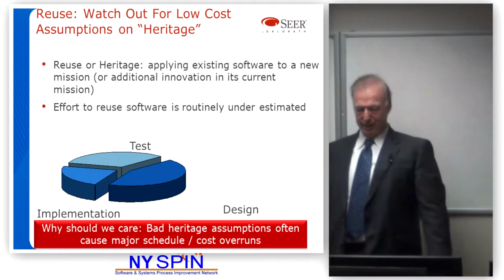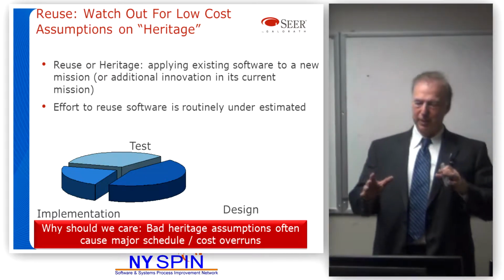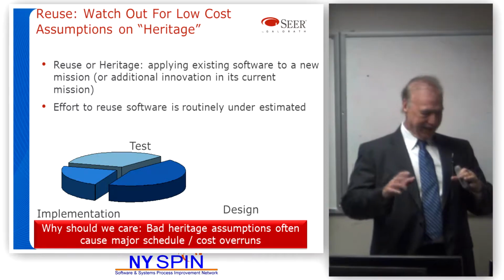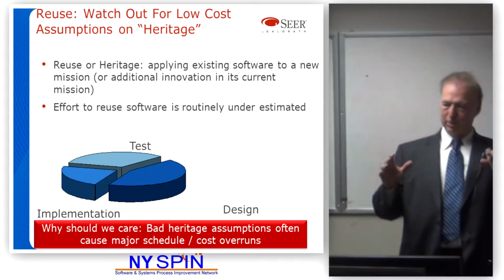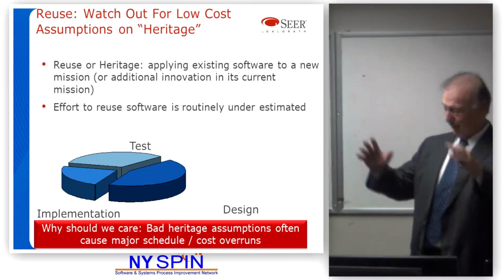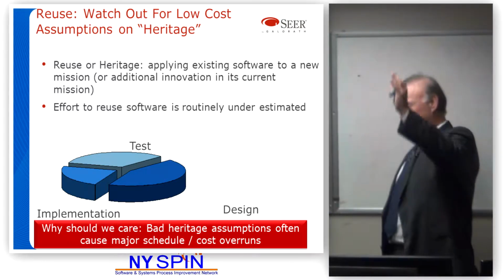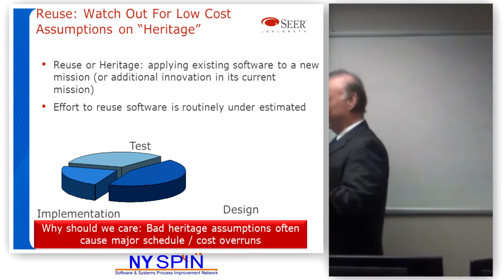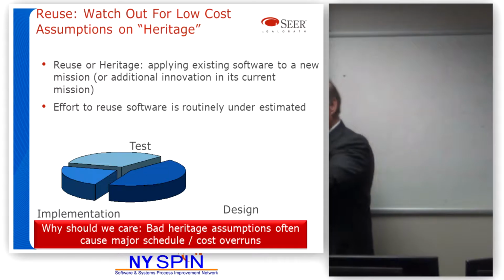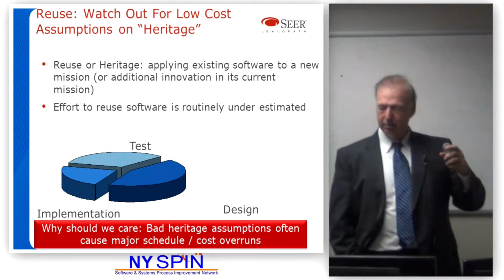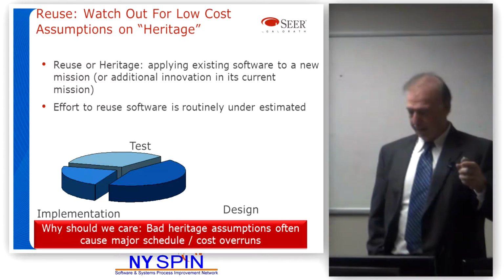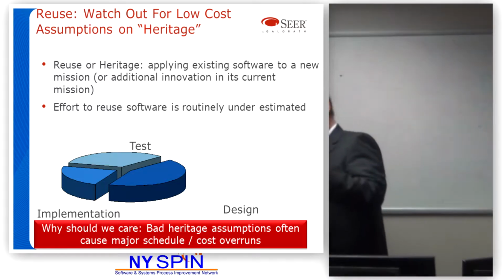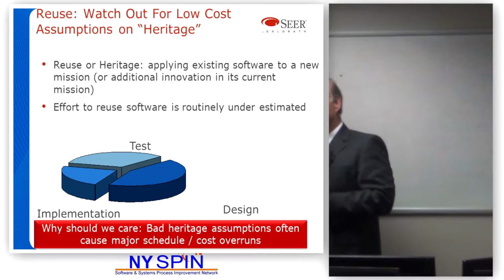It was the Ariane 5, and they assumed that all the software from the Ariane 4 was okay. They didn't need to retest it. Right, and it was in Ada, and back in those days, people thought Ada was this wonderful thing, and it solved all the world's problems. Launch happened, thing blew up. It was a software problem. Oops. You can't assume that if something's pre-existing, it's free. And I'm not talking about, I think, like Oracle or SAP. I'm talking about if you have existing software in-house, and you say, well, just modify this. It needs to be retested.